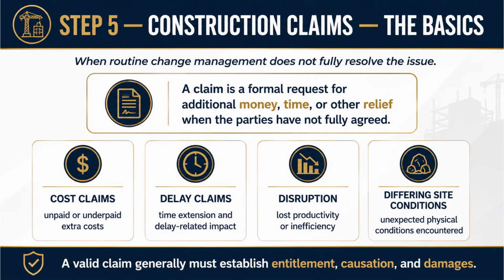4 common types of claims. Cost claims. Unpaid or underpaid extra costs. You did the work, you're not getting paid fairly for it. Delay claims. Time extension and delay-related impact. Something pushed your schedule and you want the days, and maybe the cost, recognized.